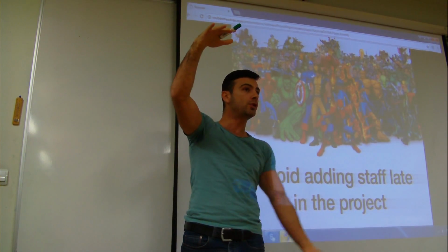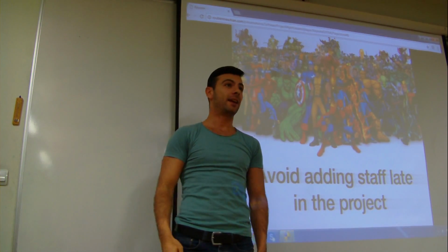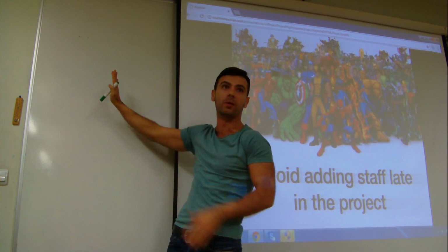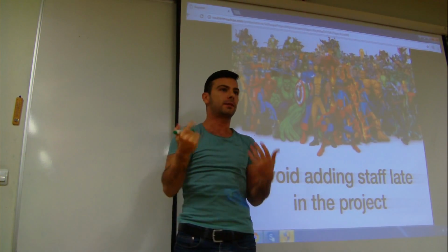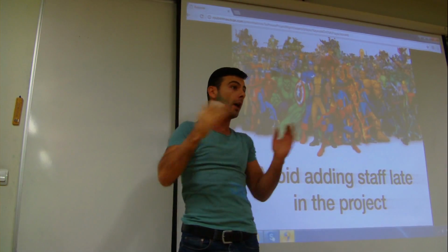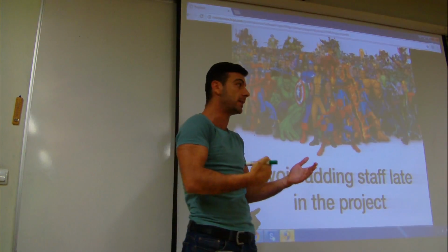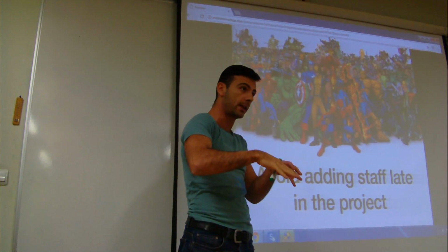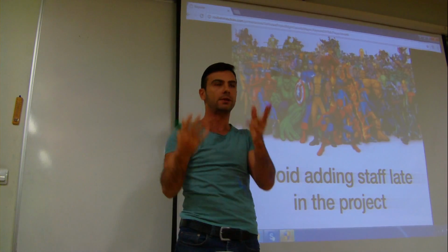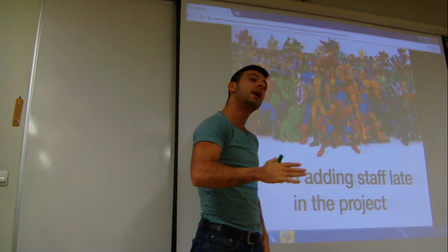Right? When you just throw someone in there and they go, hi guys, what are you doing? And they go, well, we're writing this code. Oh, cool, a variable. Can I change that? God, no. Why? Because Chaka, right? That person doesn't know what's happening, right? The other team does. Furthermore, it distracts the rest of the team because now the team that is working has to stop working and explain to this person all the various pieces that they've done. And so it slows the project down.